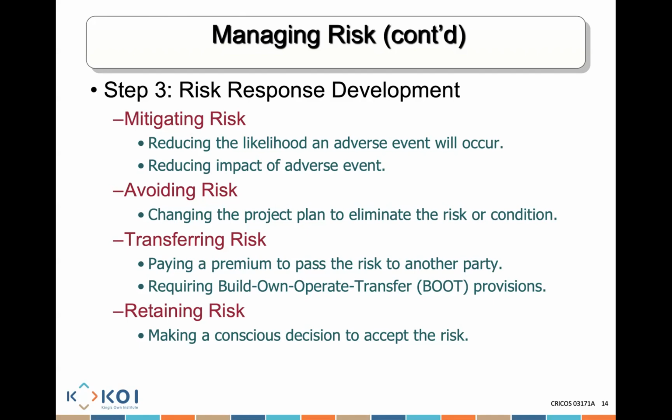So I want to try to mitigate the risk of the electricity failing. I want to really reduce the likelihood of having no electricity by having another generator that is available on the side. That's what we call mitigating the risk.